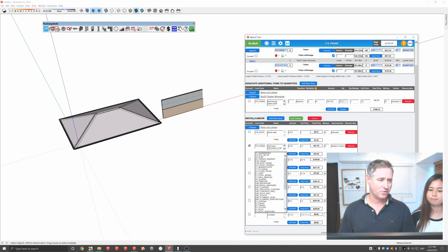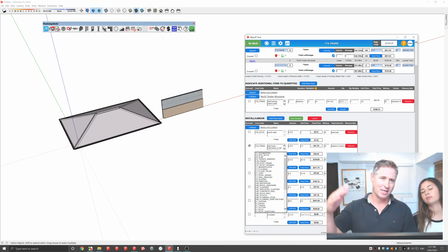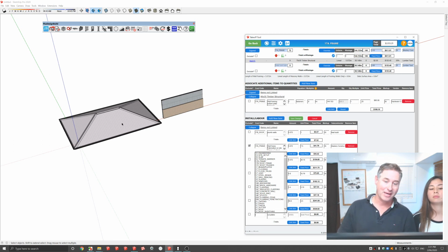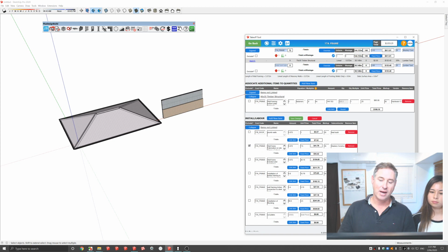So basically if you're using QuickBooks or Xero or whatever it is, you can export all of the vendors out of there and put them directly into PlusSpec, and then you can create a purchase order from all of this information. And that's really handy because you've got a 3D model here on the left, and all of a sudden you're associating cost codes, you're associating vendors and everything there, with the result of actually creating a bill of quantities. And all of those can be imported straight from your accounting software into our software.